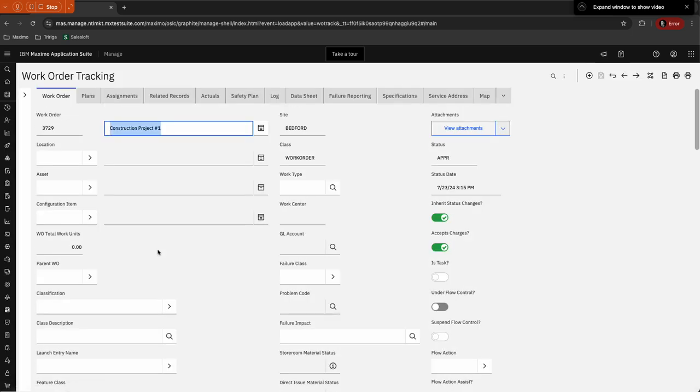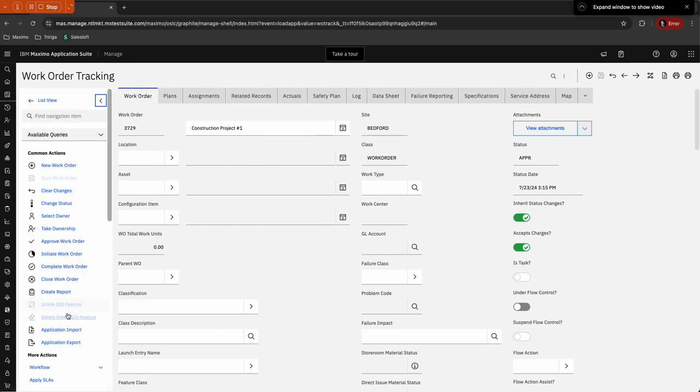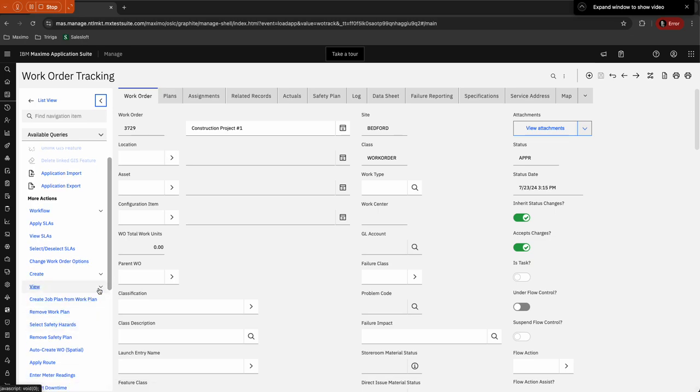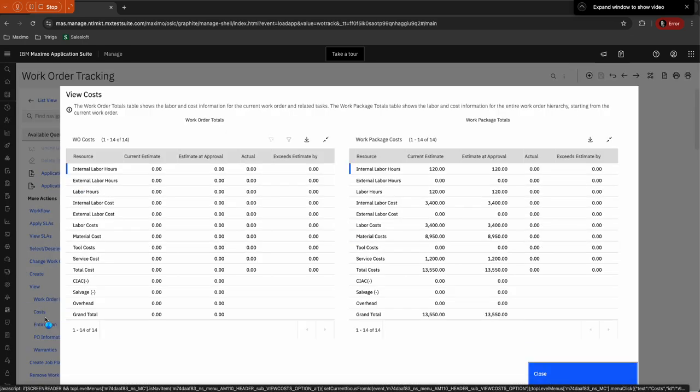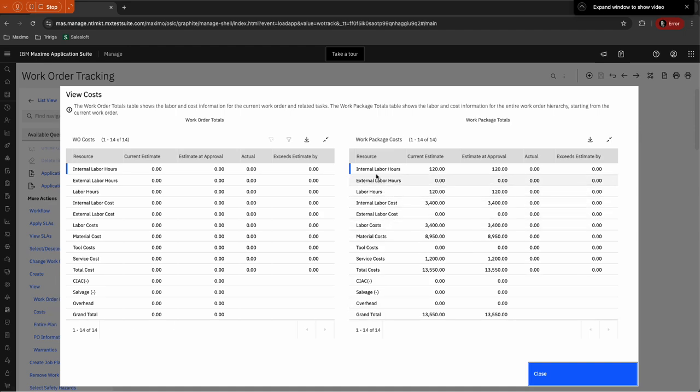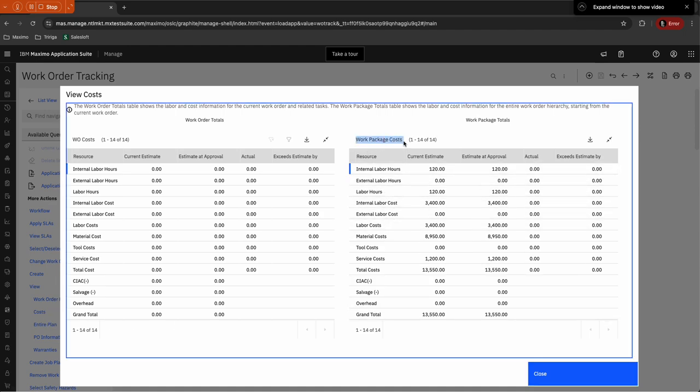Now, as Sam, the supervisor, the thing that's really important for me here is to be able to look at this overall construction project and understand things such as what is going to be the overall cost of the project. Here we can see the whole work package cost is listed and detailed below, including internal labor hours, external, what is the overall materials cost from the project.